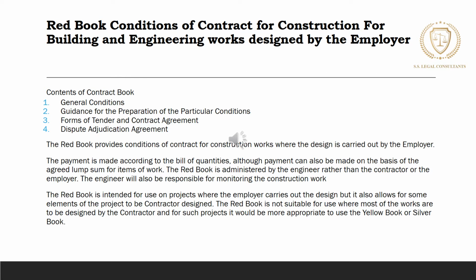The next is the Red Book, which is the conditions of contract for construction of building and engineering works designed by the employer, which is a construction contract. This form of contract is for building or engineering works where the employer has been responsible for all the design.